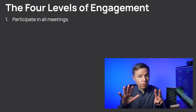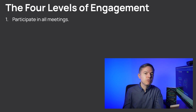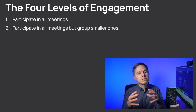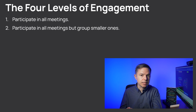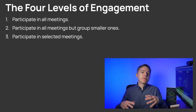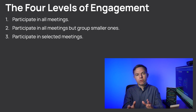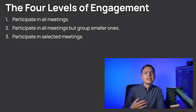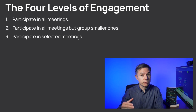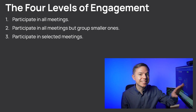But if you have 7 projects, you'll end up with 7 daily stand-up meetings, which would take 2 or 3 hours every day, which is not feasible. So I grouped smaller projects into one meeting. It reduced the logistics and saved time. The third level is when I participate only in top priority projects. That's the most practical approach for me. Because based on the milestone chart, I would select 1 or 2 projects to work closely with. But do remember that all other projects already have designated leaders.